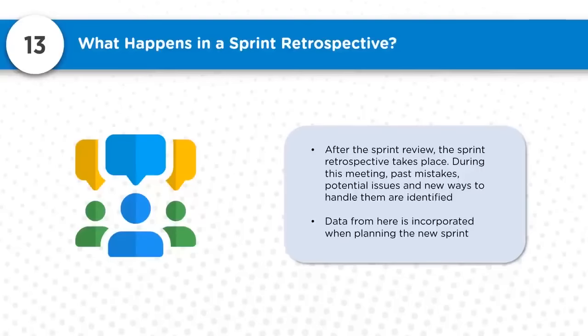Data from here is incorporated when planning the new sprint. The learning you had, you are going to collect it: what went well, what went wrong, what was supposed to be the best approach, how did we approach it, and is there any other way of doing it. These are discussed, and it is very essential to do this at the end of each sprint review.